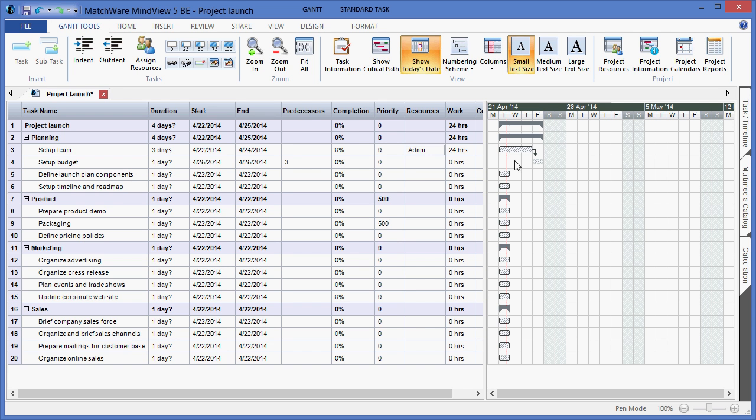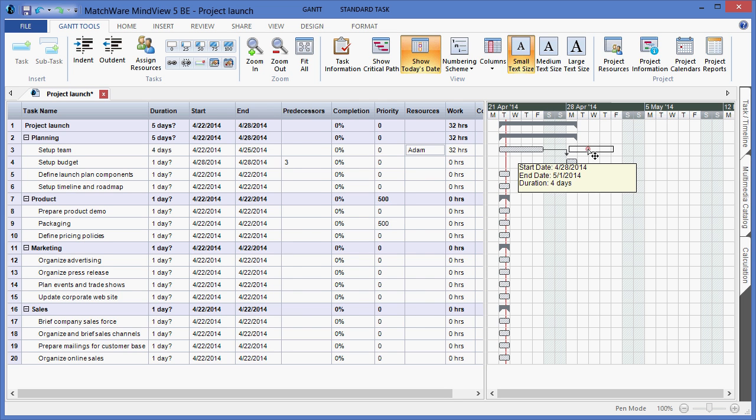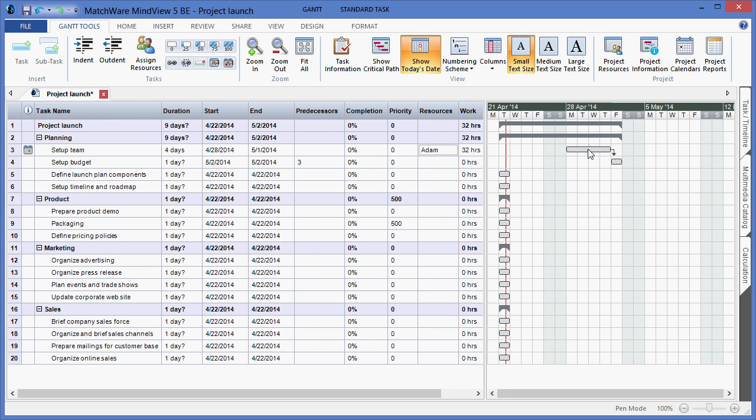I also have the ability to work within the duration bars themselves. By right clicking to extend or decrease durations. I can left click and drag to change start dates of a specific task. And by hovering the left side of the duration bar and left clicking, I can increase the completion level of a task.